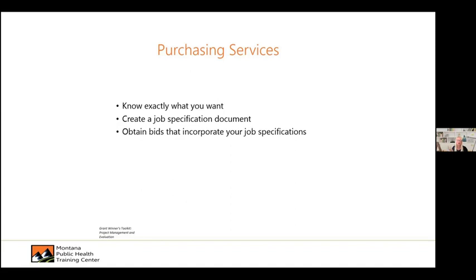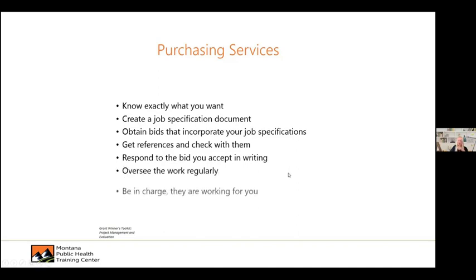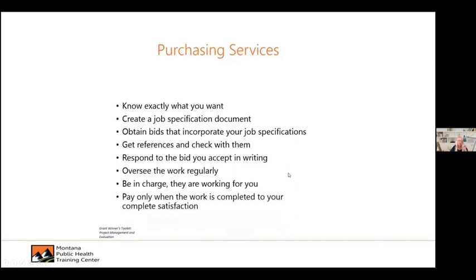Is there more than one way to do this? Do we have opportunities for more than one type of person or organization? We want to make sure we're covering that so we can justify why we picked the one that we did. We want to make sure we get our references and respond to that bid in writing. No calling up the buddy down the street and saying, okay, we're picking you. We want something in writing, again, back to that documentation. And then watch over the work and don't pay anything until the work is done, or if you set up something to pay along the way, make sure that whatever services you're contracting out, you are covering the bases.